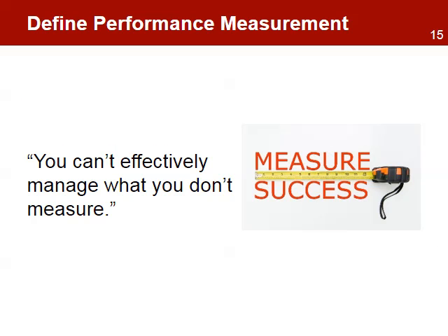The next step is the performance measurement framework, which is used to define all the indicators the project will monitor, as well as the information on the baseline data for each indicator, targets, sources of data, collection methods, frequency, and responsibilities. The framework provides a consistent approach for systematically collecting, analyzing, utilizing, and reporting on the performance of the project.